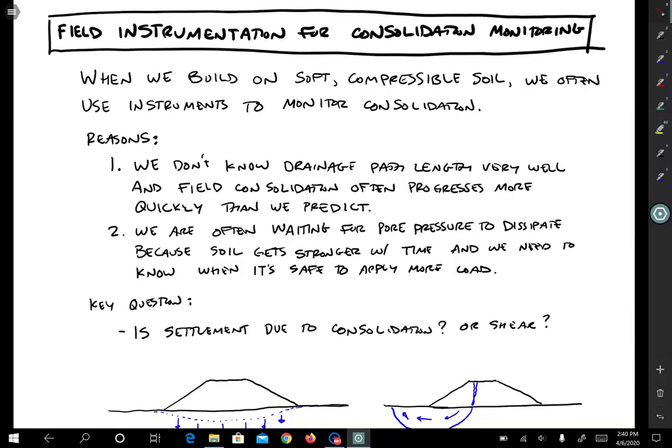Consolidation monitoring is one of those areas where convincing them to pay for testing might actually really be in their best interest. It could save them a lot of money on the schedule and time is money. So if they can get the project done early, that's great. So say, for example, we need to build something on really soft, compressible soil. We'll often monitor it to look at how the consolidation is progressing.